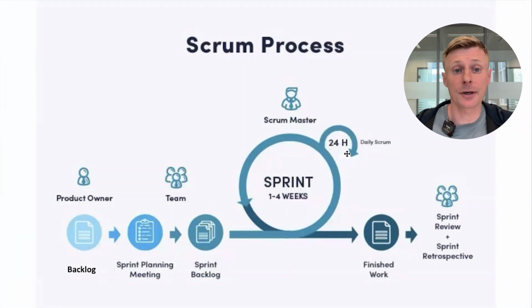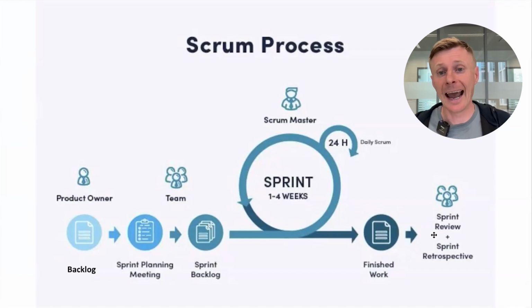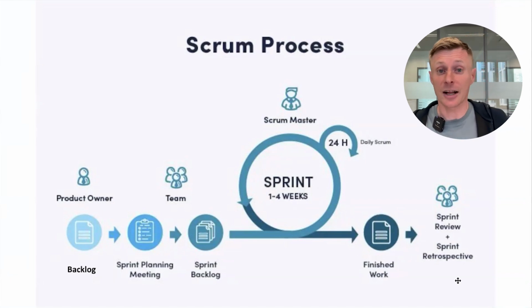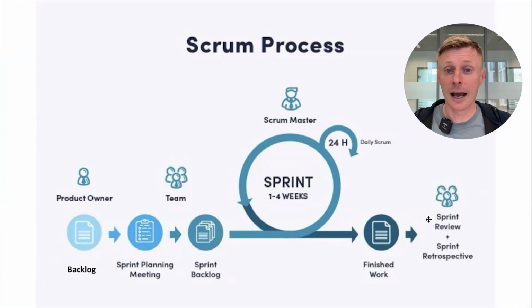At the end of the sprint, completed work is packaged for release and deployed. Any incomplete items are returned back to the backlog. The sprint concludes with two rituals: a results demonstration, the demo session, and a sprint retrospective.